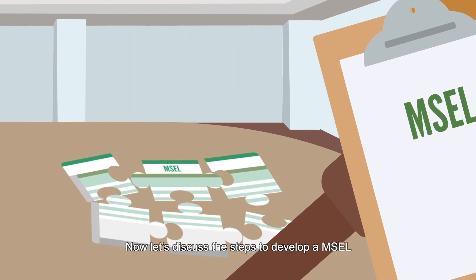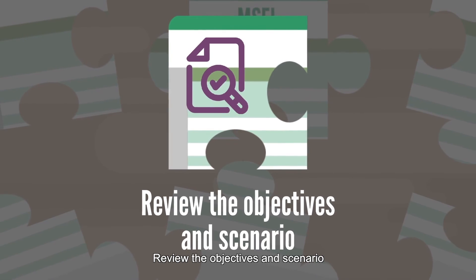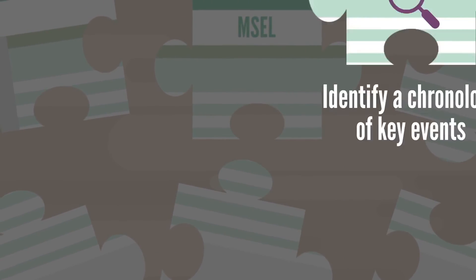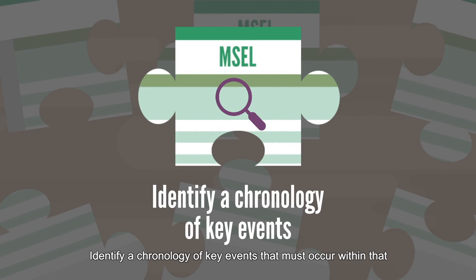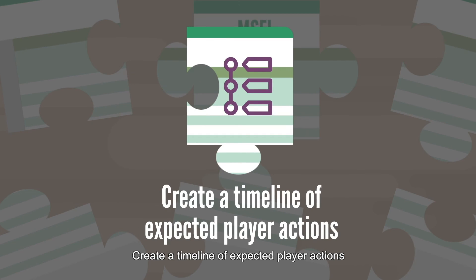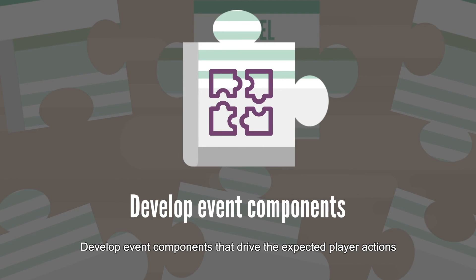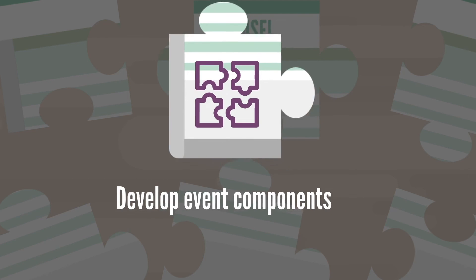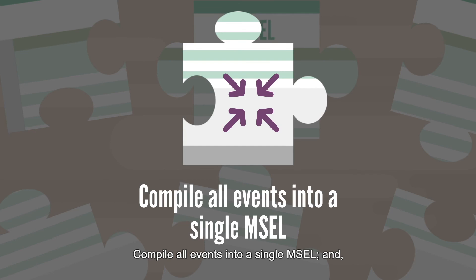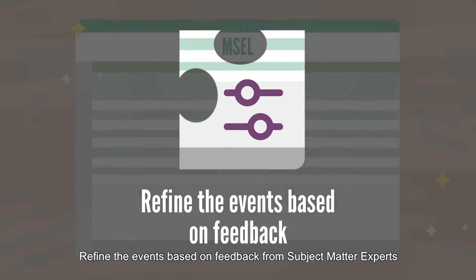When developing a MEASL, the exercise planning team should review the objectives and scenario, identify a chronology of key events that must occur within that scenario in order to evaluate the objectives, create a timeline of expected player actions, develop event components that drive the expected player actions, compile all events into a single MEASL, and refine the events based on feedback from subject matter experts.